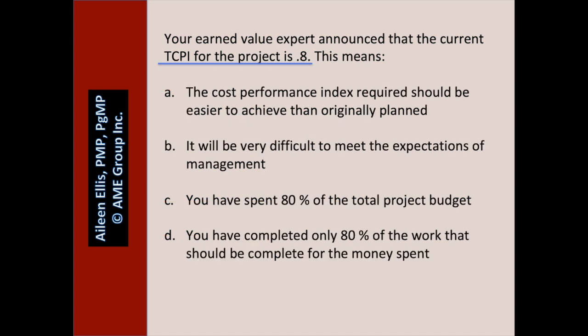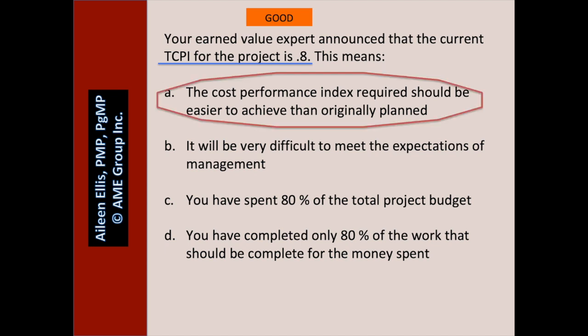Your earned value expert announced that the current TCPI for the project is 0.8. This means — pause the video and answer the question. A TCPI less than 1 — is that easier or harder to achieve compared to what we've been doing? A TCPI less than 1 is easier to achieve. A: the cost performance index required should be easier to achieve than originally planned — A is true. B: it will be very difficult to meet the expectations of management — since the TCPI is less than 1, it should be easier than it's been so far. C: you have spent 80% of the total budget — nothing to do with the question. D: you have completed only 80% of the work that should be complete for the money spent — that's not what this TCPI is about. This TCPI is a good TCPI.